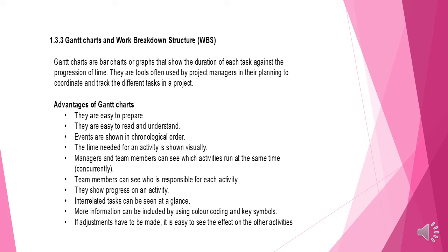Right, and then we also have electrical. Electrical can be done at the same time as plastering. That's according to our example on page 122. At the bottom there, it says a Gantt chart for a building project. That is an example of a Gantt chart. Some activities can take place while the other activities are continuing, but some must be done before the others can be done.